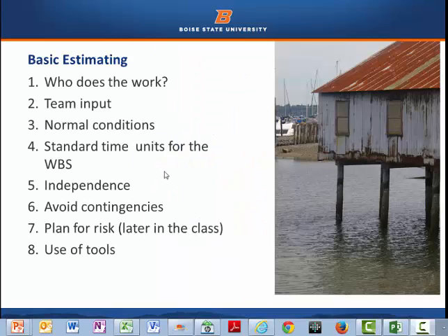As we do that, let's talk about some basic estimating activity. This leverages part of the activity in your text, which I'm sure you've all read and reviewed in the slides. Basically, when you do the estimating, who does the work? That's the best source of information. I like the team input to get material and cost estimates. They tell you the most about the activities.